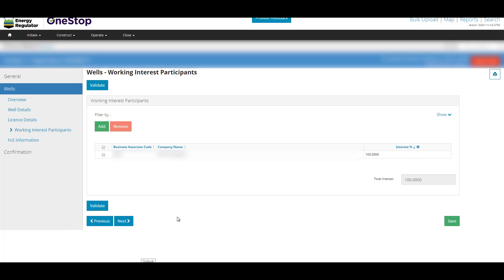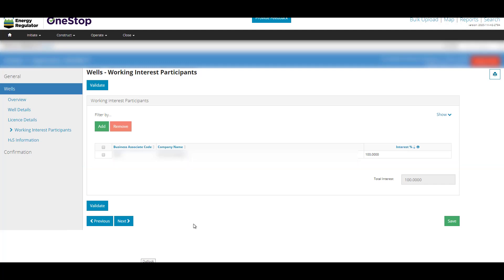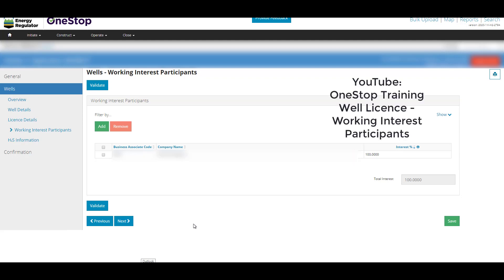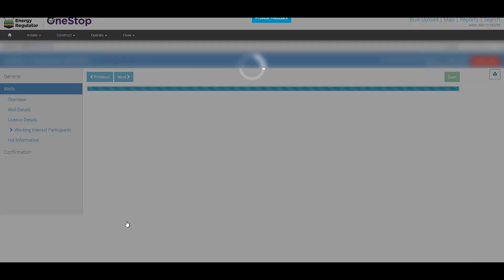Complete or Confirm the Working Interest Participants page, ensuring interested parties add up to 100%. For more information on working interest participants, please search our YouTube channel for the video on OneStop training, well-licensed working interest participants. Click Next.